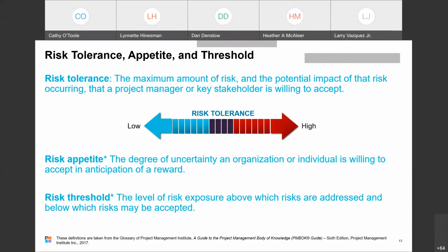If my risk is below $100,000, I should tell somebody, but it's not something that they're going to make a big deal about. So, there's this thing between $0 and $100,000 where the department is pretty well okay with accepting a level of risk. But as soon as I think that exposure is going to be greater than $100,000, I have to put it on everybody's report, and everybody needs to know. So that's kind of like a definition of a risk threshold. My threshold in that case is $100,000.